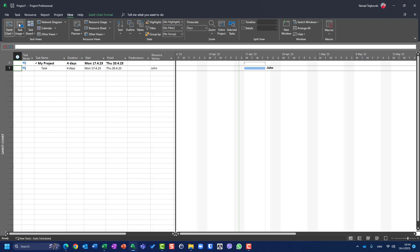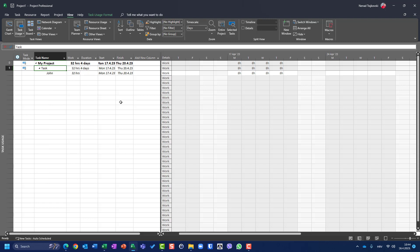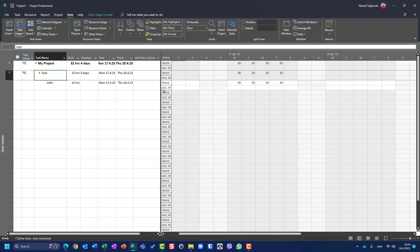Let's switch to task usage. You can see that John is going to work eight hours per day from Monday to Thursday. I'll right-click here and put some actual work — we'll need that for later explanation. Now let's say that this task has been delayed for some reason. It will not be started on Monday, but it will be started on Wednesday.